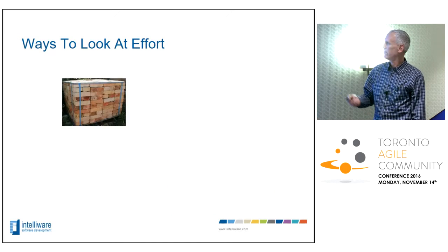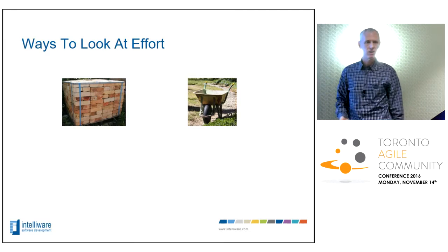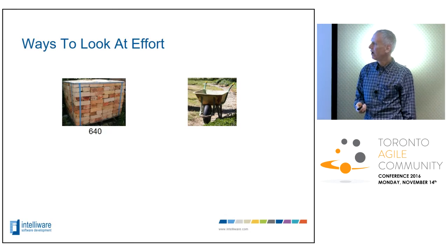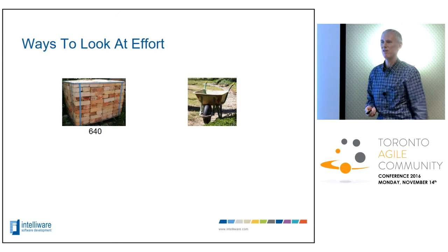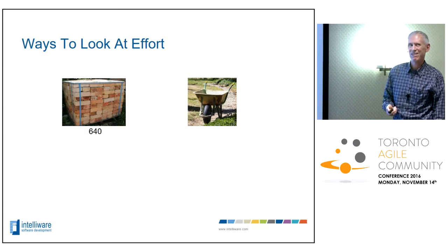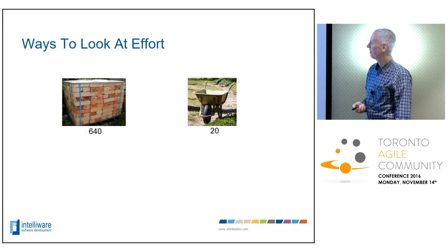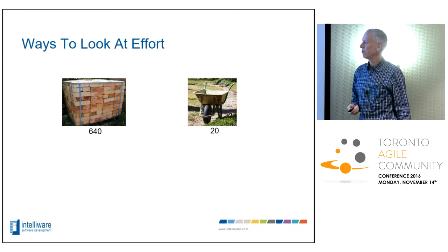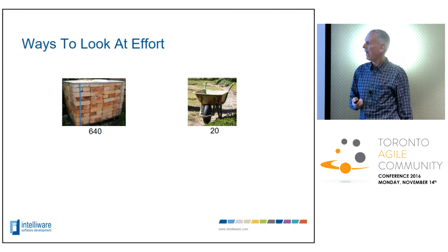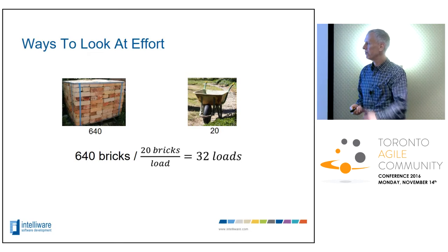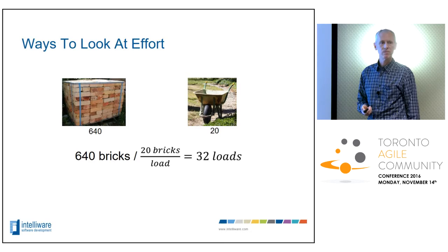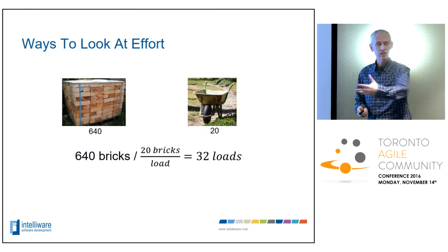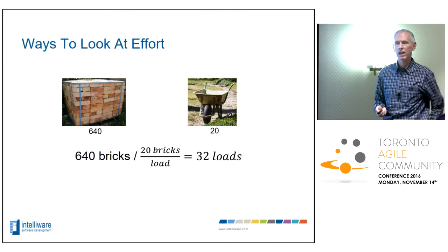So again, if I've got my load of bricks and I'm going to use a wheelbarrow to wheel the bricks into the backyard, I actually counted the number of layers and how many are on each layer. I think there are about 640 bricks there. I've got nothing better to do. And I'm guesstimating 20 bricks per load in the wheelbarrow. So the effort then is 640 bricks divided by 20 bricks per load, which is 32 loads. So that's a measure of effort, right? It's going to take me 32 loads to get those bricks into my backyard.